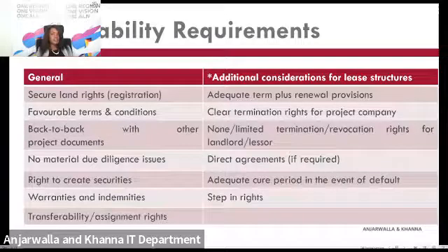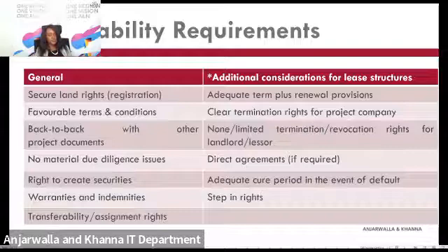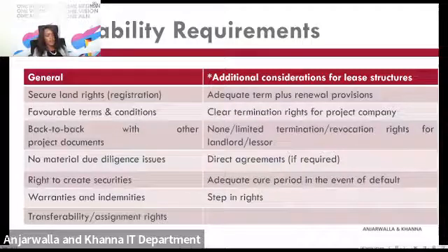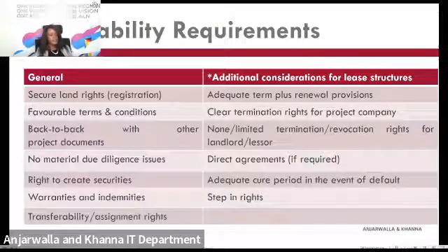I think there are a lot of instances where we've seen projects come to a halt because either the community was not consulted, or a certain statutory process was not followed, or the public participation was not followed through as required, and therefore the use of the land becomes questionable. Then if the land has been acquired by way of lease or outright purchase, there must be favorable terms and conditions for the use of that land and for the payment of compensation to the previous owners, so that the project is able to proceed without crippling the budget.